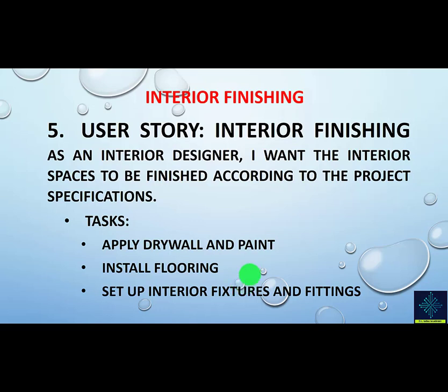A fifth user story would be the interior finishing. This comes from the interior designer: as an interior designer, I want the interior spaces to be finished according to the project specifications. Tasks involved might include apply drywall and paint, so drywall or gypsum board, sometimes we call it gypsum board, and paint, then install flooring, set up interior fixtures and fittings.